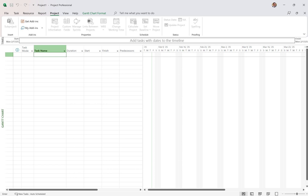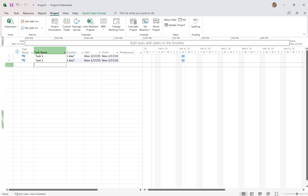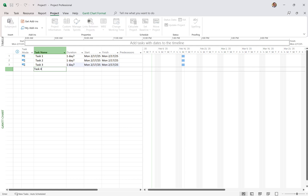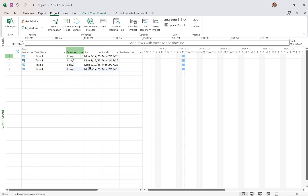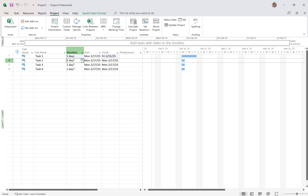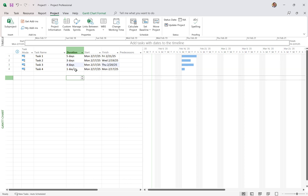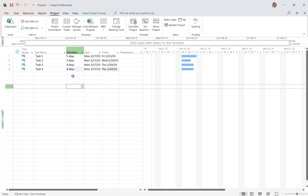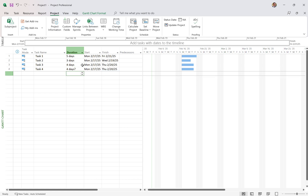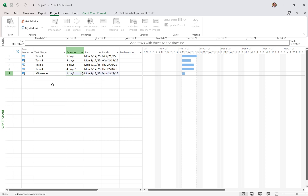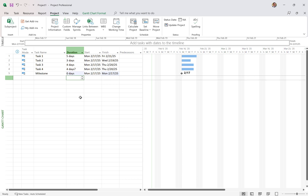So let's put in some tasks: Task 1, Task 2, Task 3 — you get the idea. Because it's auto-scheduled, it's giving me default durations from the project start date on the 17th. Come in and adjust the durations. If you have a little question mark, that means you've never touched that — it's an estimated duration. You can say four days, or four with a question mark if you're not sure. I'm going to put in a milestone: just type the name and make it a zero-day duration. Boom — we have a milestone on the Gantt chart.